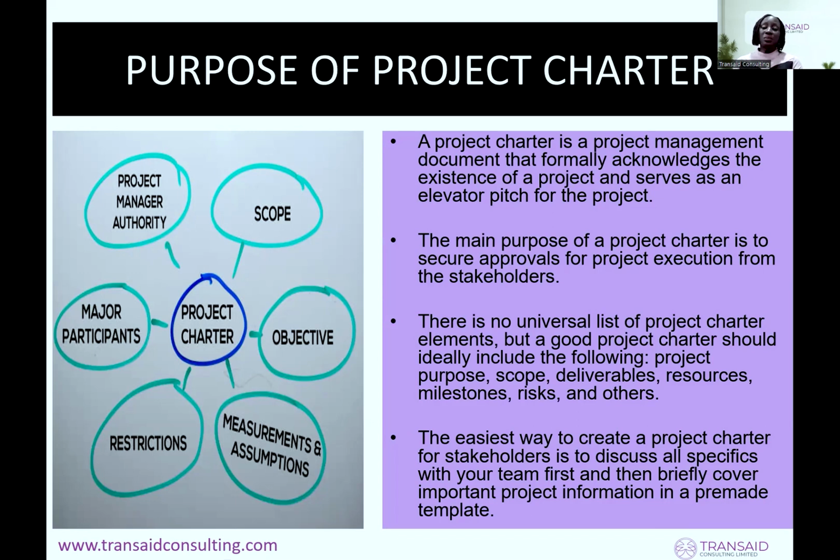So let's look at the project charter first. What is a project charter? It's a project management document that formally acknowledges the existence of a project and serves as an elevator pitch for the project, for people to buy into it. The main purpose of the project charter is to secure approval for the project execution from the stakeholders. So you need to define certain things. It's a high-level planning. It's not more details. It can just be a 1-page document.